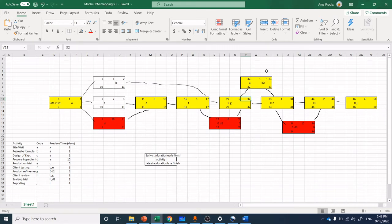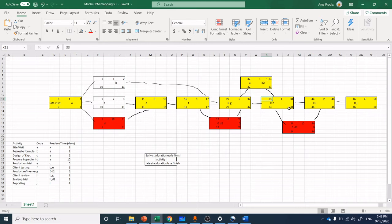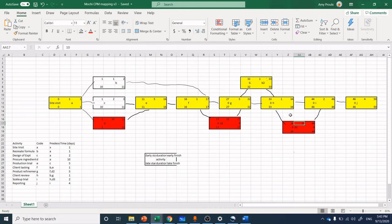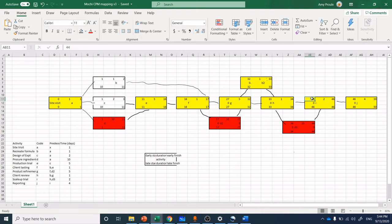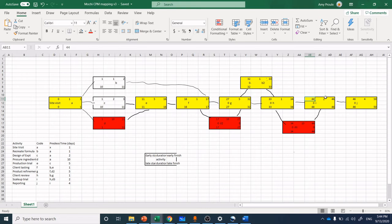So we went from day 17, 17 plus 10, and going into the next production run, if we need to have that procurement activity, we can't move ahead. If there's no procurement activity, we could be starting at day 17, and so on, but because we've got 10 days lag, we've got to go to 27 as our start date, five days for production at day 32. Now, this is a recreate the formula, the original formula, from a baseline comparison perspective. So one day for that, and that puts us at day 33 here. Day 33, we're doing a tasting, and the client approves. We may have to go back to procurement again. I put these as an offshoot, because you're going to see in a moment. So we're at day 34. Day 34 plus 10 is day 44.